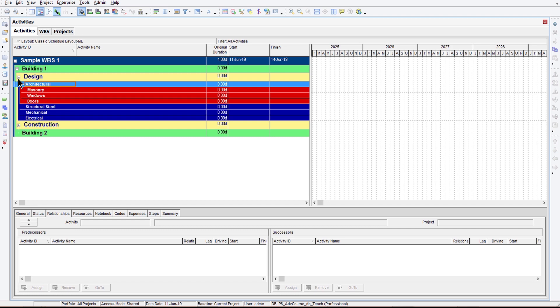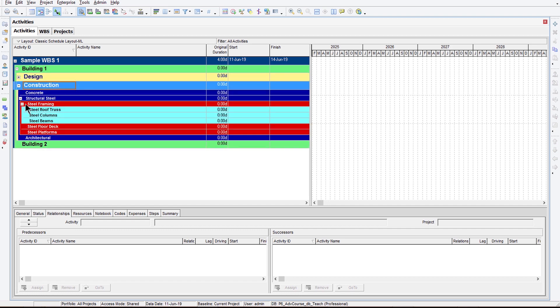Let's look at construction. I'll just roll design back up. Let's look at construction. Construction, same thing. We've taken construction and we've broken it into our disciplines and then into our sub-disciplines or our work packages.